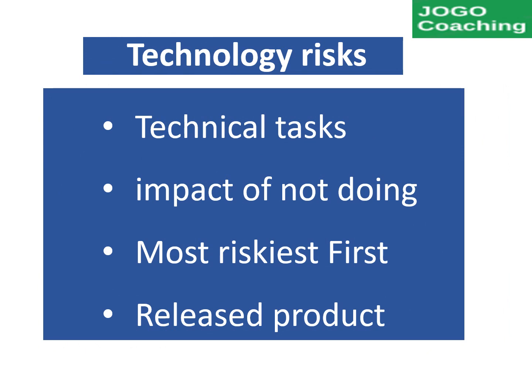The next technique is technology risk-based prioritization. The team will work on technical stories along with user stories. For example, the activities related to test automation, performance improvement, and application security are created as technical stories. By using the technology risk technique, user stories will be prioritized based on the impact of not doing the technical tasks. The most risky story will be prioritized first, and the remaining order will be based on the lesser risky stories in the backlog.